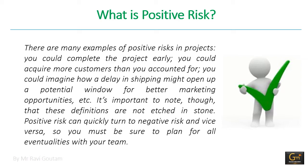Negative risks are part of your risk management plan, just as positive risks should be, but the difference is in approach. You manage negative risks to minimize their impact, but positive risks can also be managed to take full advantage of them. There are many examples of positive risk in construction projects — for instance, you could complete the project early or acquire more customers than you planned for.